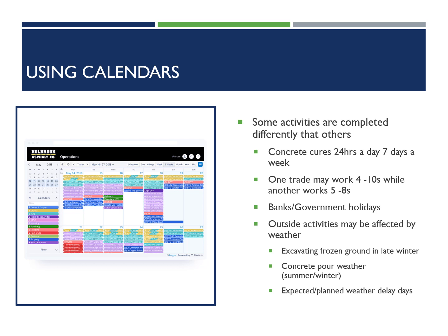We need to take weather into account when building our schedule and have a good understanding of how it's going to impact our activities. So we build a weather calendar, and that weather calendar essentially says these are the number of days that we can plan on being shut down from doing any sort of outside work in a given month.